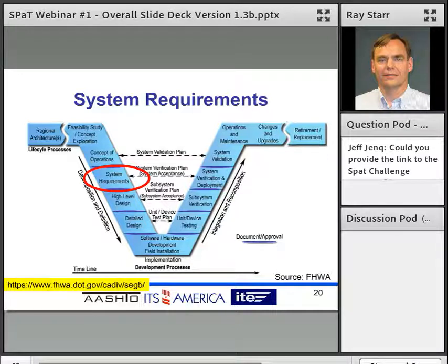This document does not define how the system is to be built. So a lot of times people want to, I've seen a lot of variety of CONOPS and requirements. Some of them don't even think of the users when they're talking about stakeholders. And when they talk about how it works, it's all about how the different parts of the system within it is going to work. And that, to me, is not really what's valuable in the CONOPS and the system requirements. We want kind of a functional thing. What does it have to do? And the next stages in the system engineering process will define how you're going to build it. But this lets you make sure you didn't overlook what it is you're trying to do.